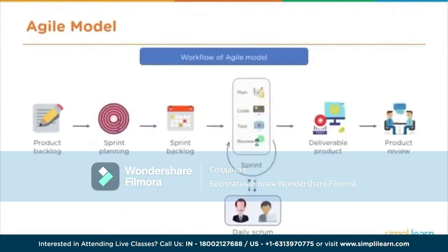What we have here is a breakdown of the ceremonies and the approach that you bring to Agile. Typically, a product leader will build out a backlog of products, what we call a product backlog. This will be a whole bunch of different features, and they may be small features or bug fixes, all the way up to large features that may span multiple sprints. When you go through the sprint planning, you want to break out the work so the team has a mixture of small, medium, and large solutions that they can implement successfully into their sprint plan.